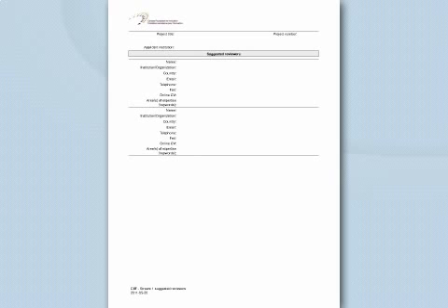Should the Canadian dollar, which is very strong now, go down, and your item that you were going to purchase in the United States becomes suddenly a lot more expensive, well, the CFI again will not increase its contribution to meet this unfortunate event, so you have to plan for this as well.